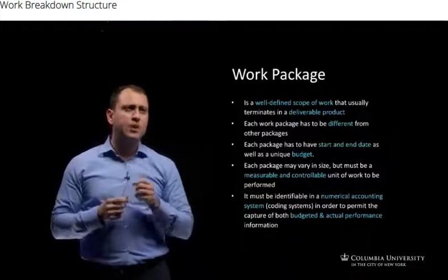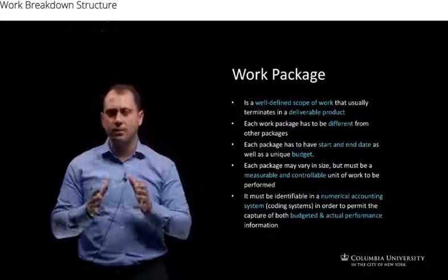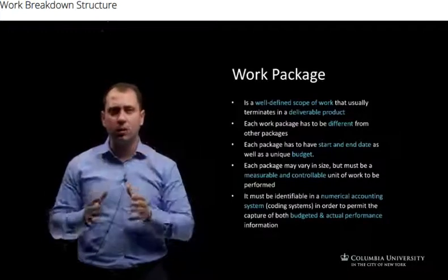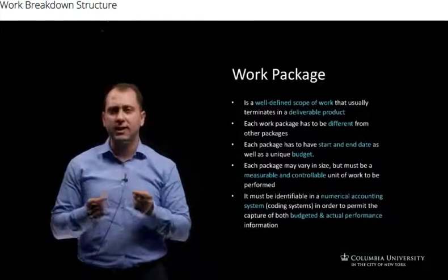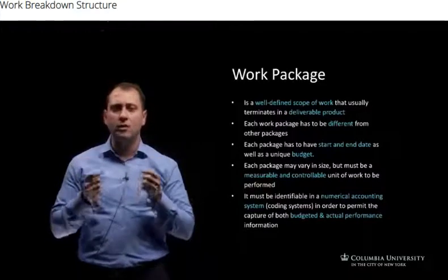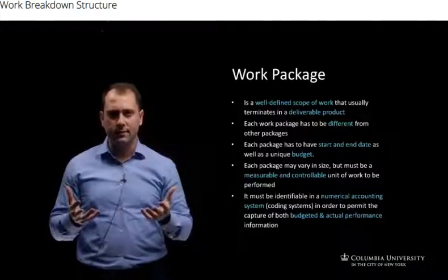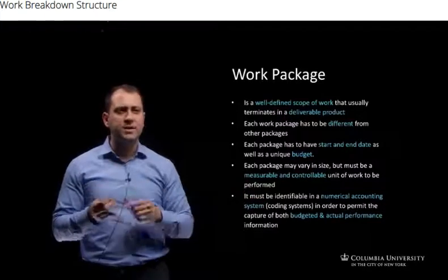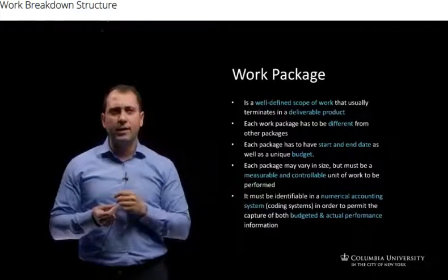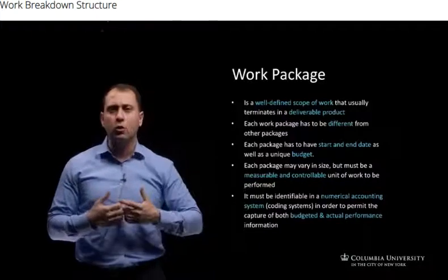Third or fourth, each package may vary in size but has to be measurable. It has to be controllable, because once we have measurable and controllable work packages, that means that we know how to define or measure our performance for the entire project later. And that will highlight the last point here, which is it must be identifiable in a numerical accounting system, or what we call a coding system.